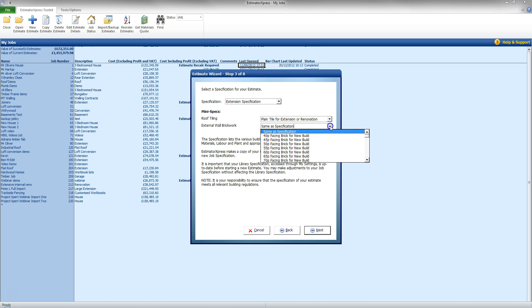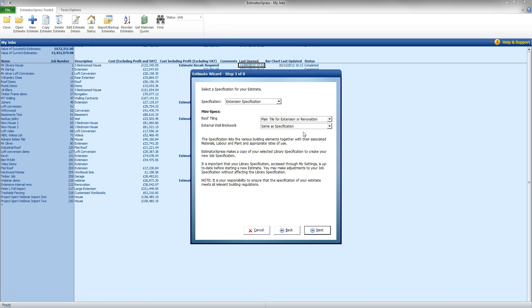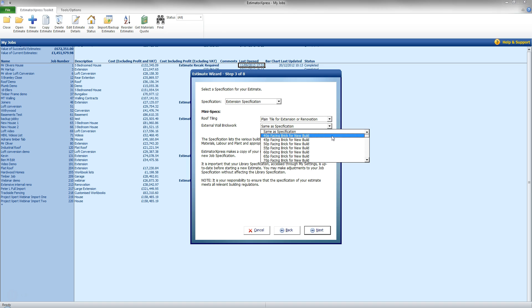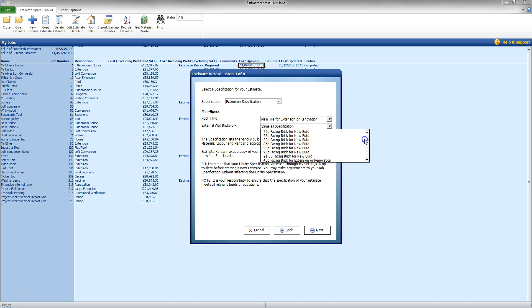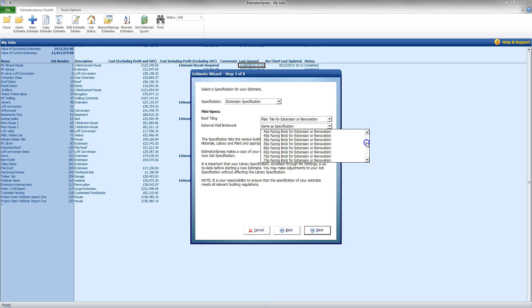And the external brickwork here I am going to say same as specification. I am going to leave that as default. But to give you an idea what that can do I can select from a different priced brick for new build. And going down this list I can also see that there is going to be an option there for extension or renovation to increase the labour time for actually fitting those bricks.